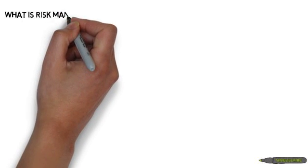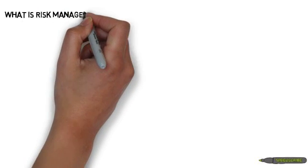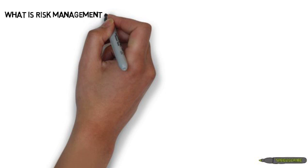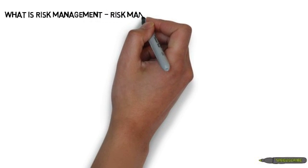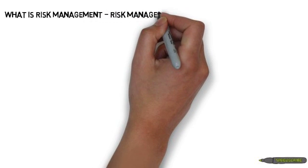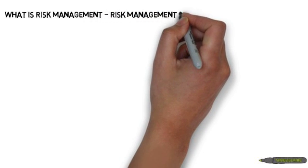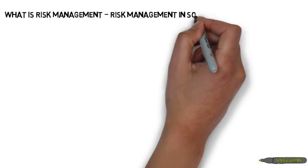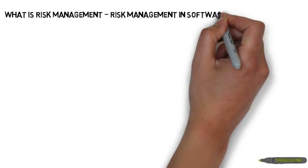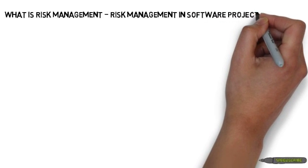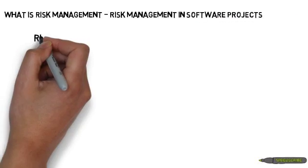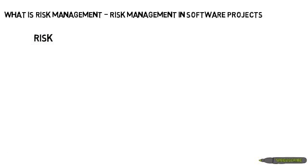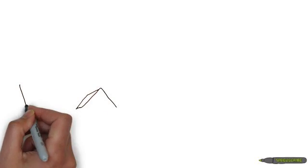This video is on understanding risk and the risk management process. A risk is a potential problem that has not yet occurred. A problem that has already occurred is called by another name — that is an issue — and it is treated differently in software project planning.